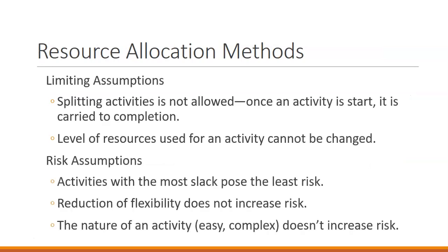We can use our slack. So when we're looking at our resource allocation methods, once an activity is started, it is carried to completion. So these are the assumptions that we have in our scheduling. Splitting activities is not allowed, and the level of resources used for an activity cannot be changed.